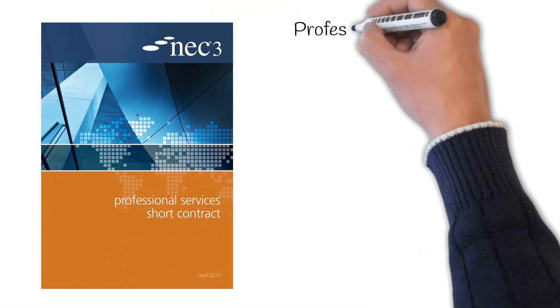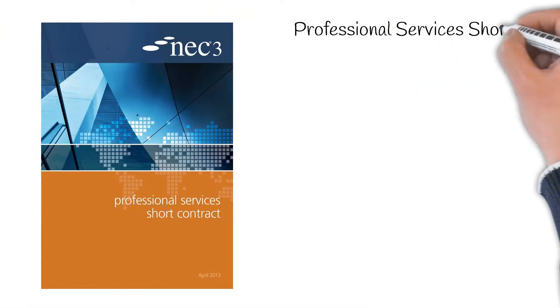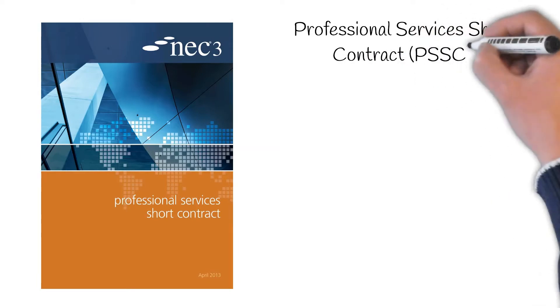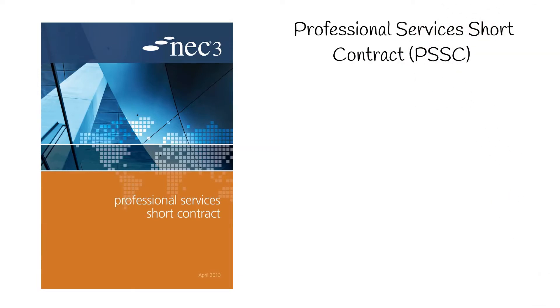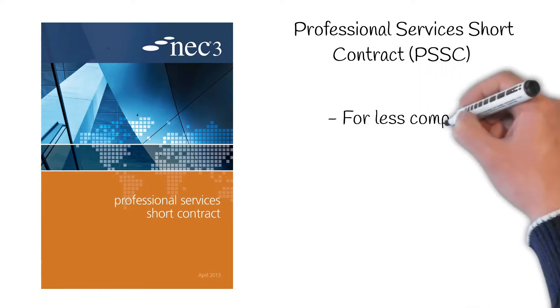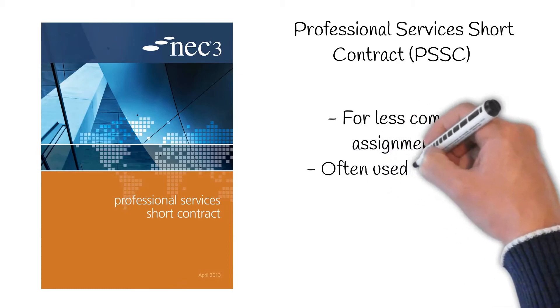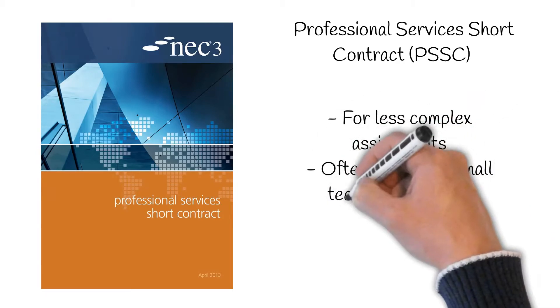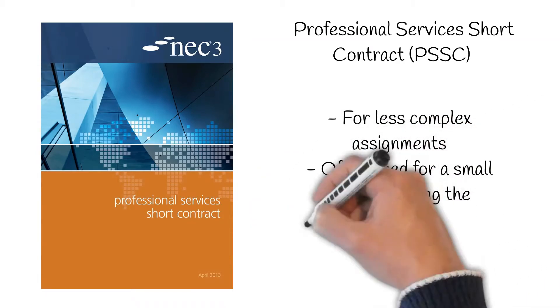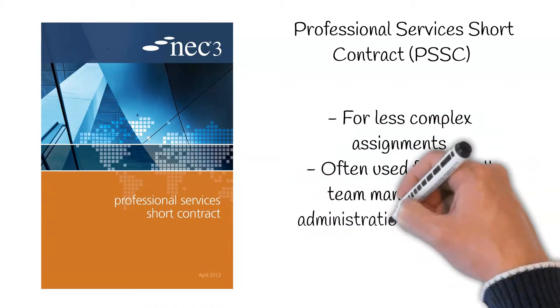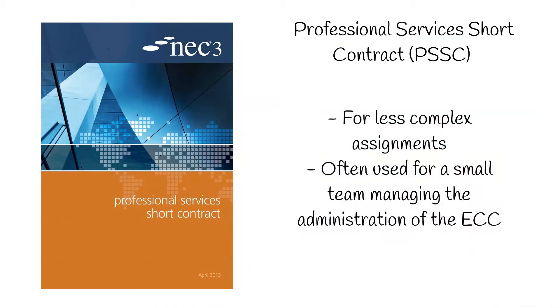Professional Services Short Contract, or PSSC for short. This is for less complex assignments carried out under the PSC. This contract is often used for a small team who manage the administration of the ECC on behalf of the employer.